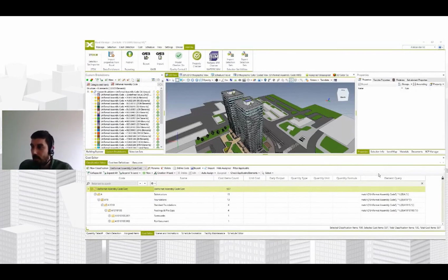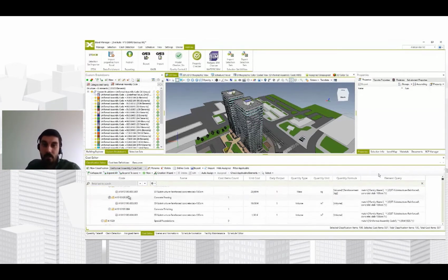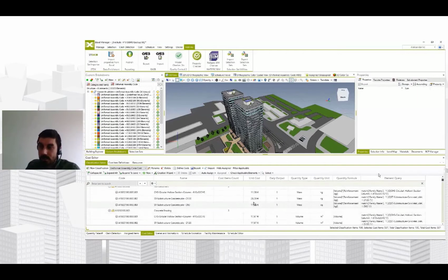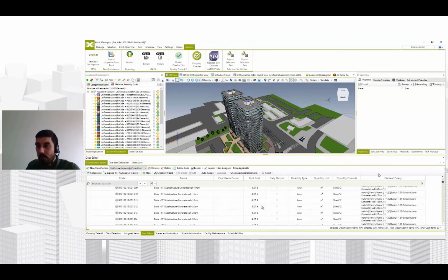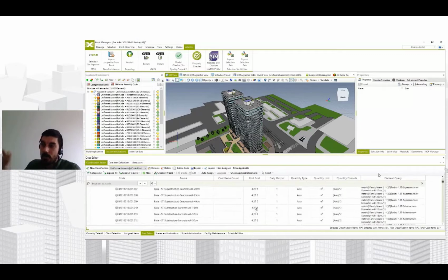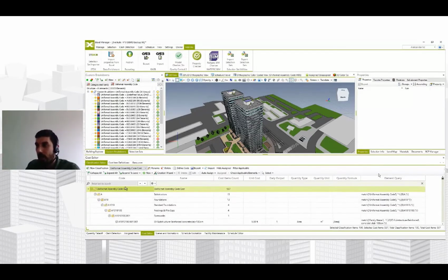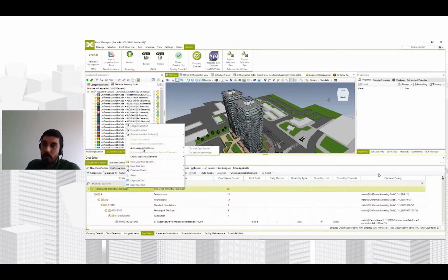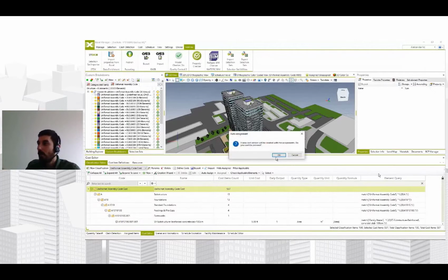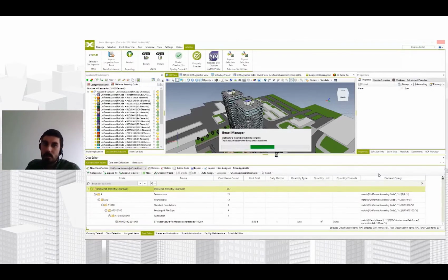to Excel Manager, and basically with this import, what you were able to do is just add another layer of information, to add the prices into the cost classification that was automatically created from the information within the model and from the information available in your knowledge templates. So now you can just assign this cost classification to the model elements and get a project budget, basically.